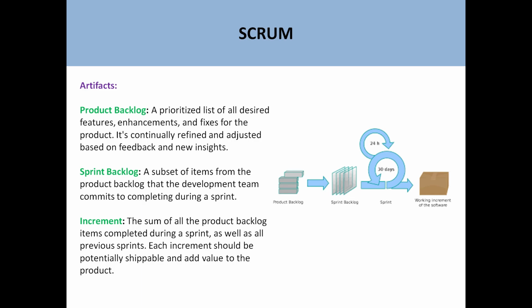Next is the sprint backlog. Now what is a sprint backlog? See friends, the product backlog as a whole is the complete set of requirements. For example, in the e-commerce solution there are 40 requirements. Whenever we are starting a new sprint, we take, for example, 10 tasks from the product backlog. Those 10 tasks which we are going to implement in the sprint are called the sprint backlog.